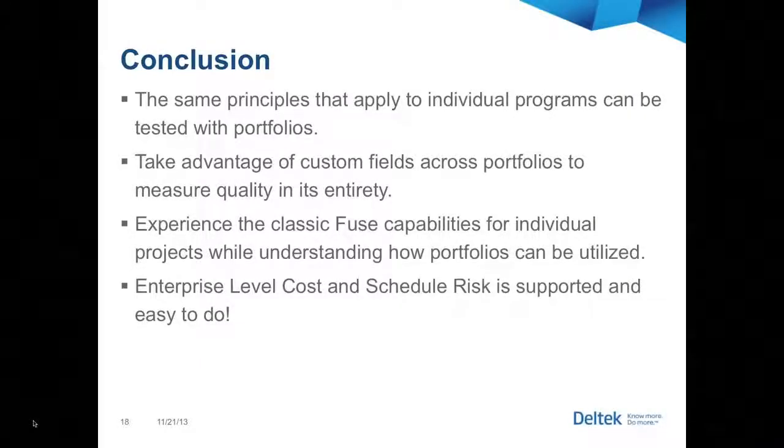The same principles that apply to individual programs in the suite can be scaled up to your portfolio. Number two, and I can't emphasize this enough, and I'll show you exactly where to find that article that we've written, take advantage of custom fields across portfolios to measure quality in its entirety. That was that location field, followed by that manager field that I used. If I didn't have a consistently coded location field across my portfolio, I would not be able to do that level of portfolio analysis.